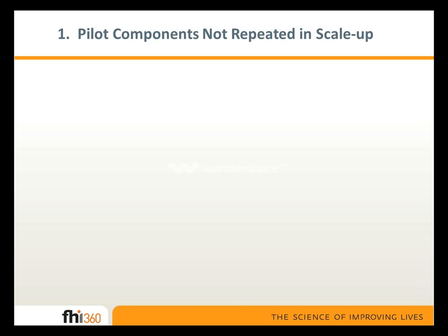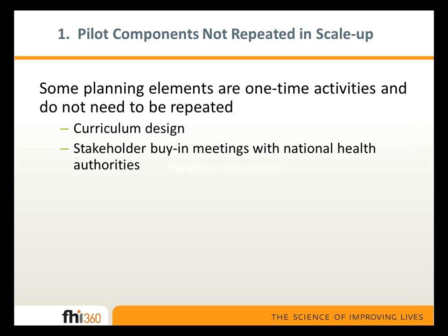First of all, pilot components not repeated in the scale-up. So a good example of this is in the planning phase, where planning for the pilot intervention, you might actually carry out activities that could also be exploited in the scale-up, and you wouldn't have to repeat them. So some planning elements are one-time activities that don't need to be repeated. If your pilot project included the design of a curriculum, for example, a training curriculum, that curriculum could probably be used with minimal changes in the scale-up, and so that cost wouldn't be repeated in the scale-up.